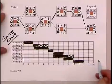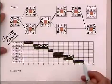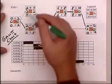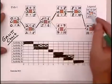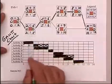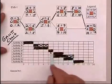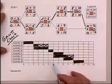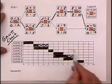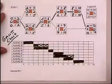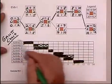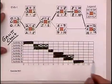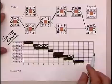Here we have a Gantt chart. The start should correspond with the numbers of the early starts, and then you just mark off the duration for each of the activities. Then go back and indicate where the slack is. This is a very famous chart, and every student of project management should be able to do this.